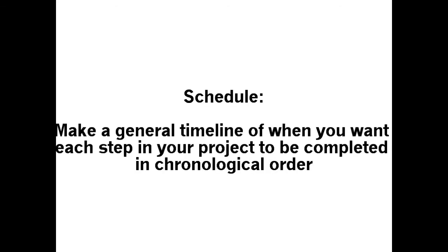Once you've identified the resources necessary for your task, you can start to schedule your project. By estimating how long it will take to complete each task, you'll be able to create a general timeline for the extent of your project. Make sure that when scheduling, you determine which tasks are dependent on the completion of other tasks and develop a critical execution path to account for this.